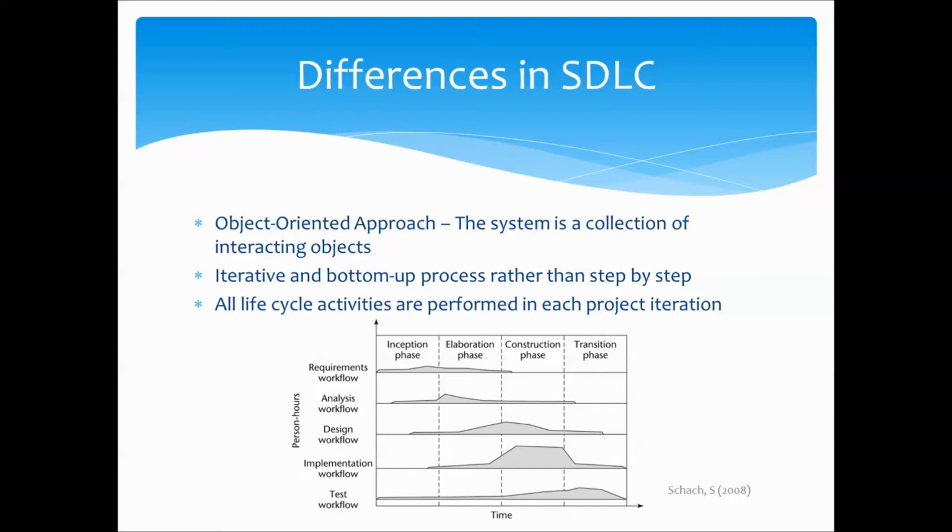One popular methodology used with object-oriented design is the unified process. In this process, as you can see in a model of it here, phases of the life cycle are divided into the inception, elaboration, construction, and transition phases. In each phase, all the steps of the traditional life cycle process are performed, to varying degrees though. The graph shows that the relative time and effort spent on each step of the life cycle changes depending on the phase of the project.